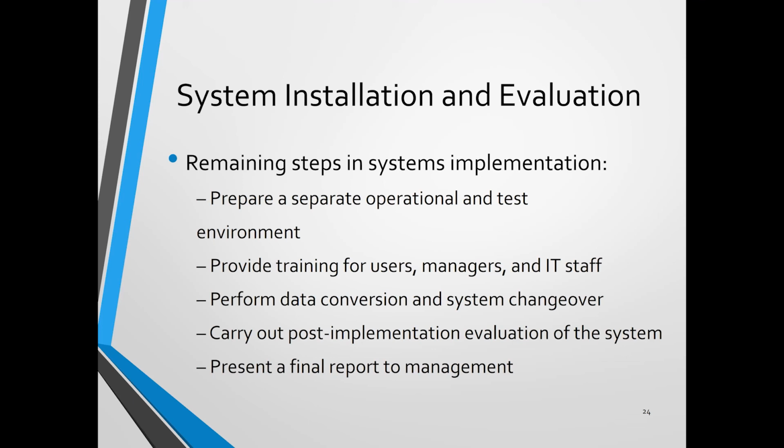Some of the data conversion needs certain dates first. For example, if some of the data is needed for the month end, right now you cannot convert the data of November month end because it's not the end of November yet, and for December we don't have the data yet because now it's only the middle of November.